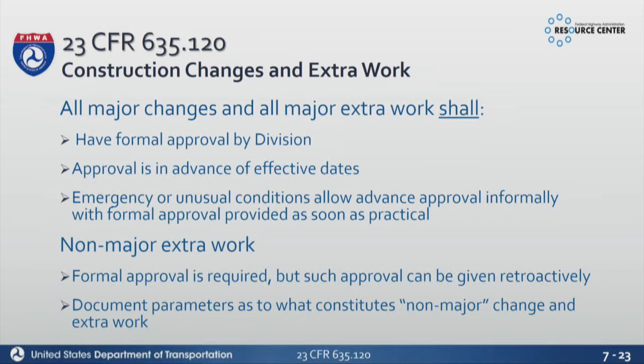So this is where we're talking about maybe different thresholds for changes or overruns and underruns. You don't have to identify those immediately and get them into FEMAS before you actually incur the cost, because you may not even be aware that you're overrunning until you've actually overran. So we understand that, and we can do retroactive on those, and those are a little bit easier to manage. But the major changes, that's the big one that you have to be focused on.